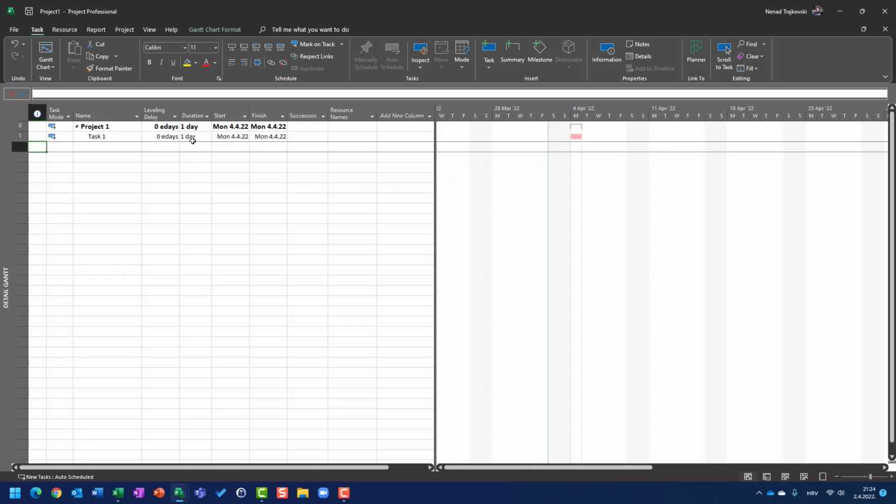Obviously, because if this task will have 2 days duration, the whole project will not be finished on Monday, 4th of April, but it will be finished on Tuesday, 5th of April. Okay, now, that is the answer. My first question: is it possible that we have a project without a critical path? The answer is no. Every single project has at least one critical path, which brings me to question number 2. Can we have more than one critical path in a project?